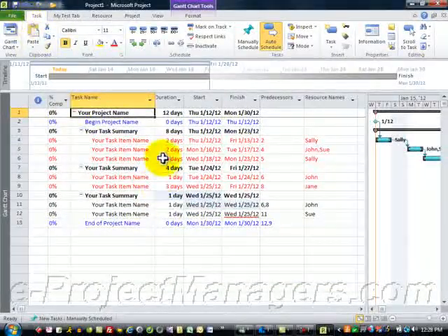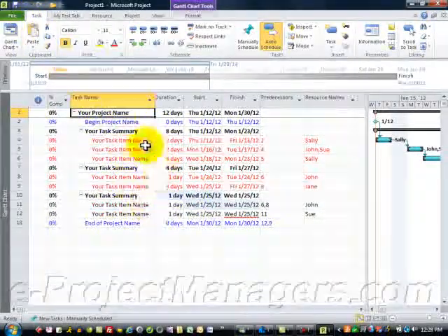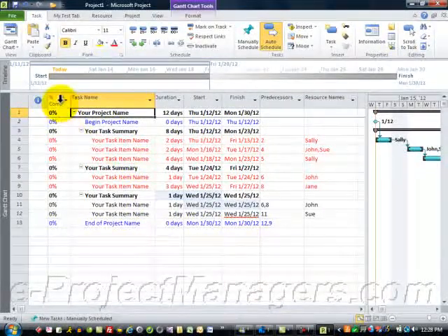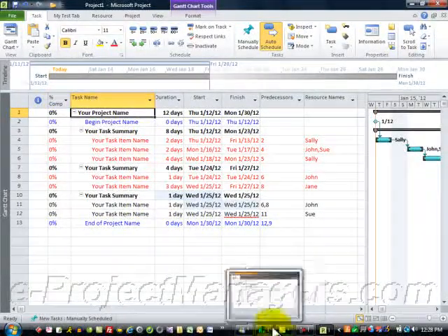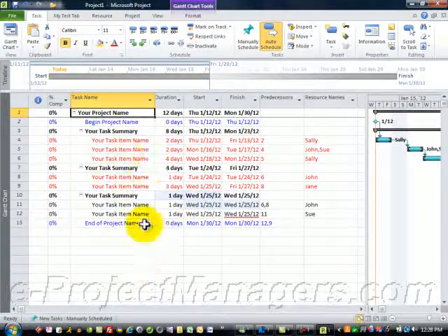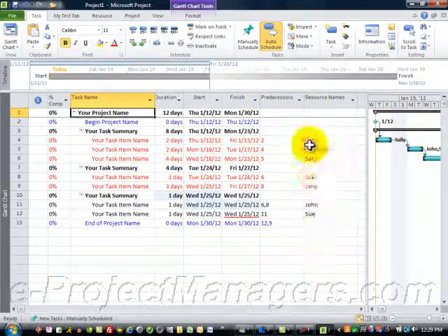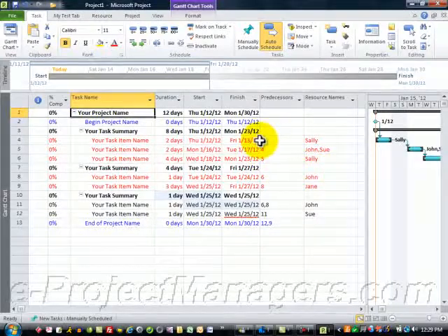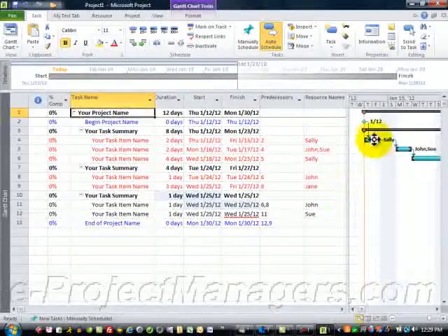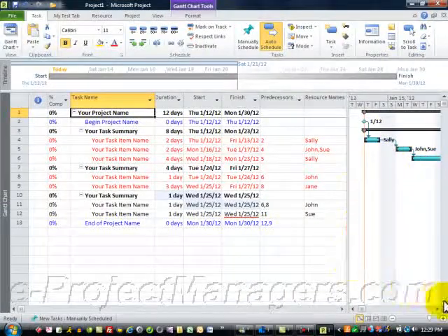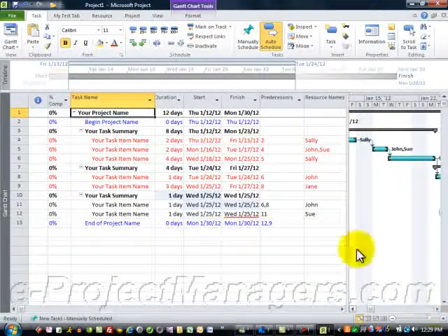So, when you have a project schedule, and below here is a dummy example, I inserted the % complete column. I formatted my text styles so that milestones appear blue and my critical tasks appear red. I added some dummy data, I put in some resources, and I put in some predecessors. And on the Gantt chart here you can see a little bit about how these tasks are currently appearing.